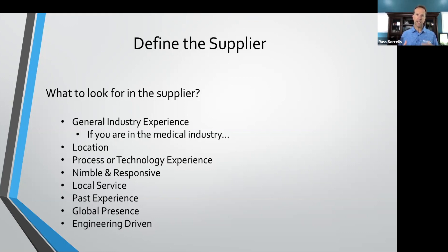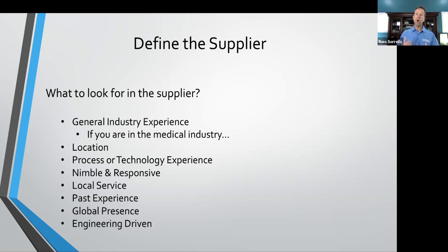Technology experience is very important. If you have a new process you've never done before, you do not want to select a supplier for whom it will also be a new process. That's two parties who don't know much getting together to do something they've never done — that is a recipe for a bad outcome. We often convince ourselves we can make it work because both parties want to succeed, but going with someone who's never done something before, especially when you also lack that knowledge, just doesn't make sense.